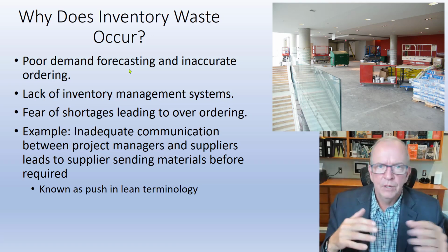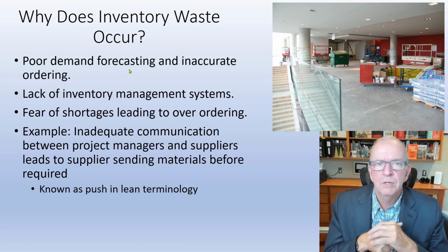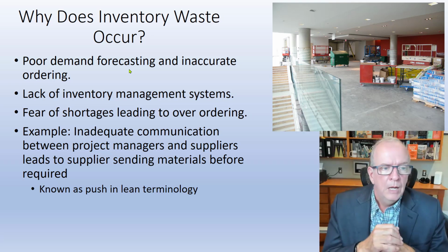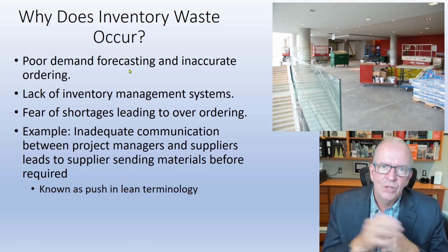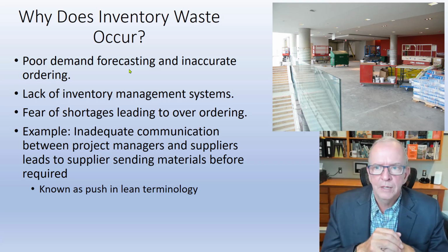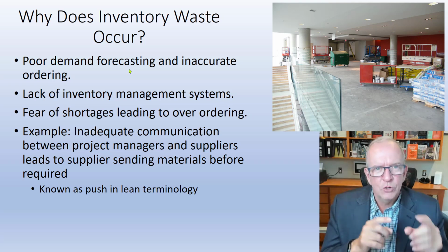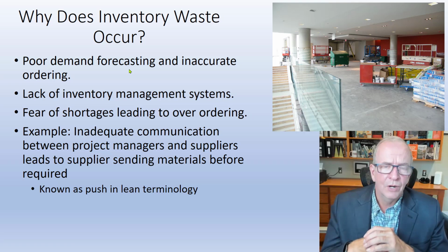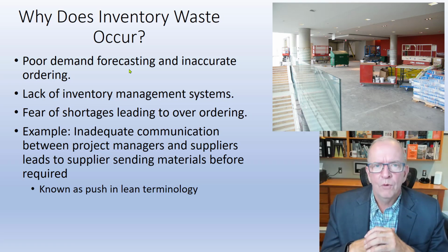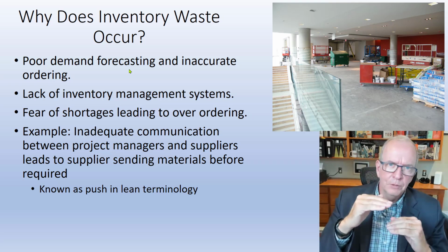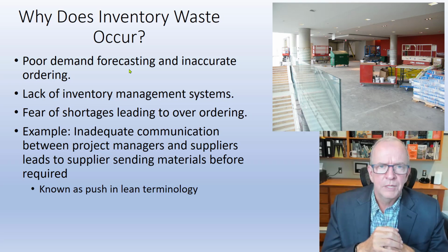That we kind of get into in the overproduction stuff, where we've got extra steps and we look at, well, what things did we do that we shouldn't have done or should have done? And so that's tied to the lack of inventory management systems. And as I said, it's a fear factor. You get a little bit nervous. Now, some things you want to make sure you've got enough extra of. I don't want to be short a half a meter of concrete, right? But at the same time, I don't want to have ordered 3 meters too much of concrete. So you want to make sure that you've got enough of a buffer that you're okay with something like that.